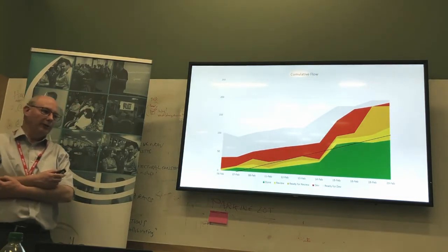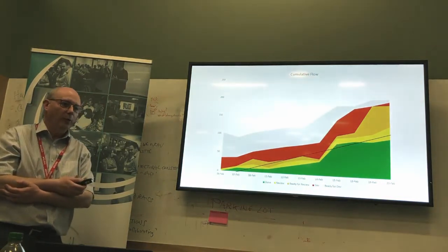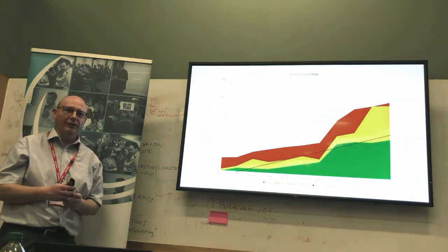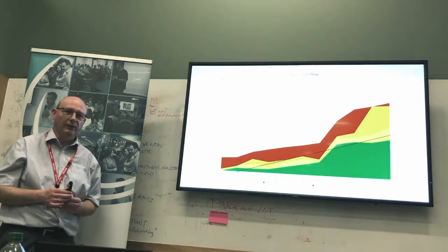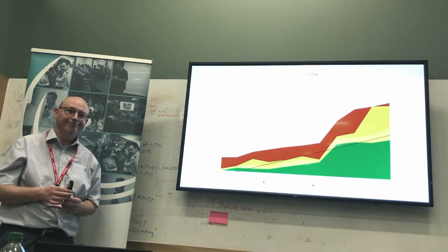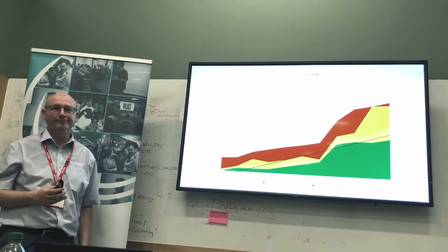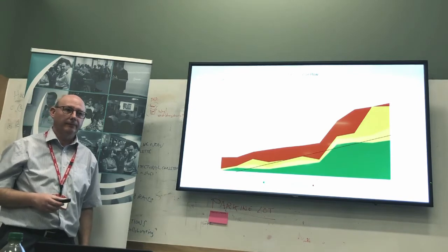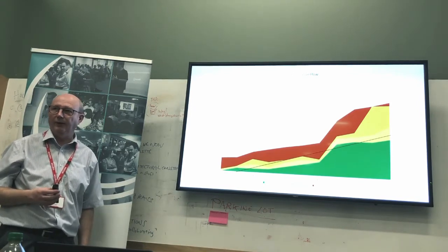If the product owner comes along and says, I want you to shoehorn this in, you say, well, we know what our velocity is, shoehorning doesn't work, what do you want to take out? But of course, you can only take out something that hasn't been started, because otherwise you're just making a mess.